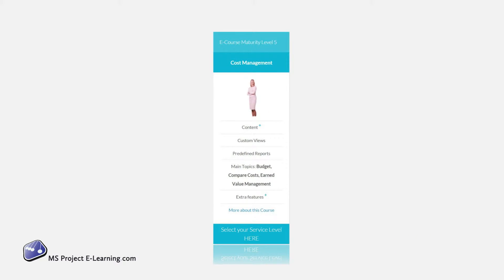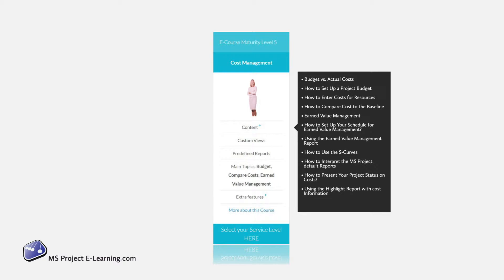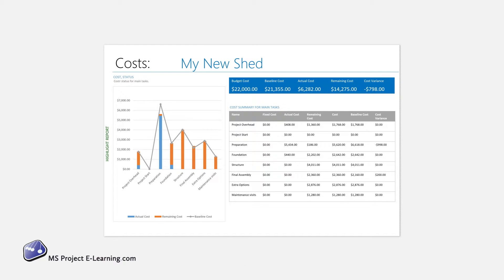In Maturity Level 5, you will incorporate costs in your schedule. So now also the financial governance for your project is covered in your highlight report. In the end, you will be able to report the project costs and earned value by applying rates for resources and costs of goods and services.